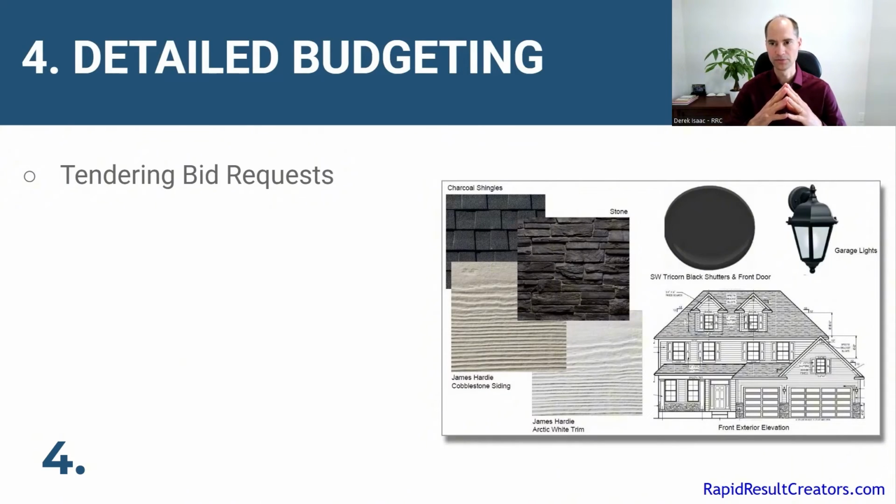The reason you don't want to go with really low bids is that if that contractor for some reason can't do the project or something happens with that contractor, you've now submitted a price to your client that includes that low bid, but now you need to maybe hire someone else that's going to cost more, and now all your margins are gone essentially. Or possibly you're losing money depending on how much of a range of pricing there is. So you typically want to choose somewhere around the middle bid, or at least not have the bottom pricing.